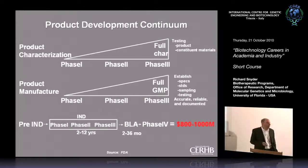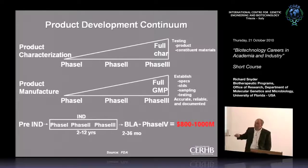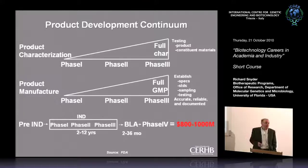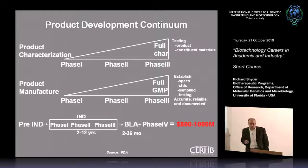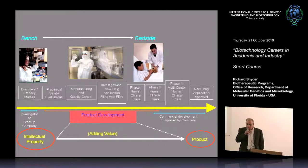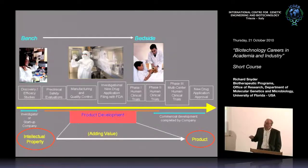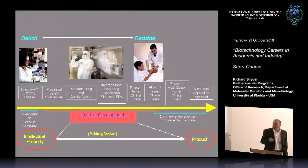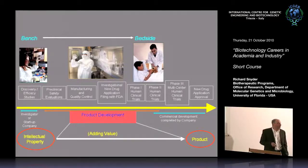This whole process takes about a decade from pre-IND through clinical trials to get a biologic license application approved to sell products — it takes about a billion dollars. As you move from discovery toward a new drug application, the value of the intellectual property that you've invented becomes more and more valuable. If you identify a gene, it cures cystic fibrosis in a mouse model, you patent that gene — the further you move along this line showing safety in animals, manufacturability, and efficacy in humans, the value of that invention goes up by orders of magnitude.